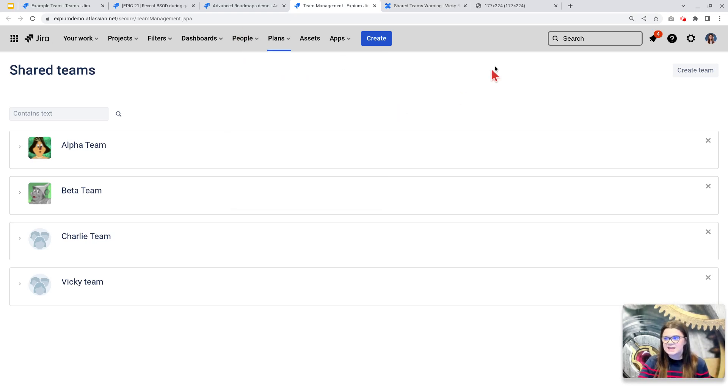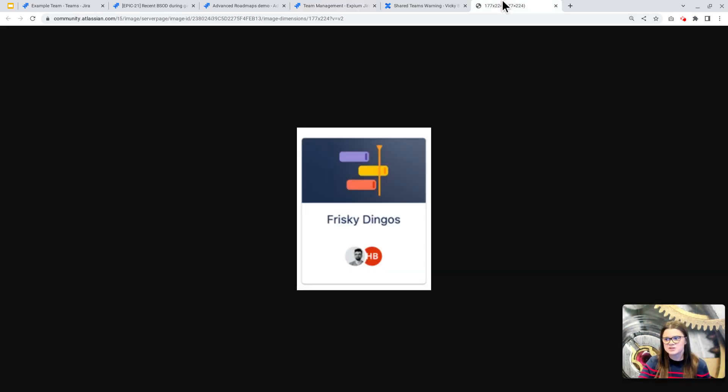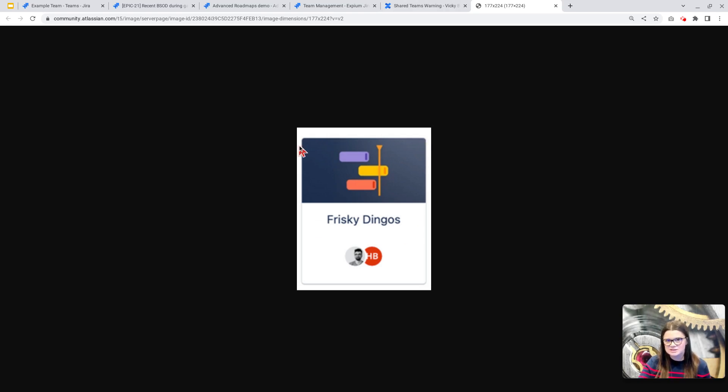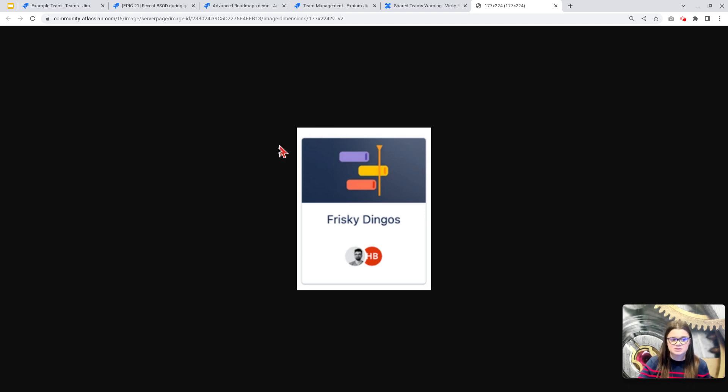Atlassian did say that to identify which teams started as an advanced roadmap shared team, you can use the team header as an indicator. Teams that started as a shared team in advanced roadmaps will have this little roadmap header here, signaling that that's really the team you're going to want to keep if there is a duplicate.